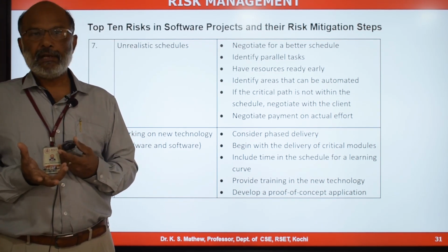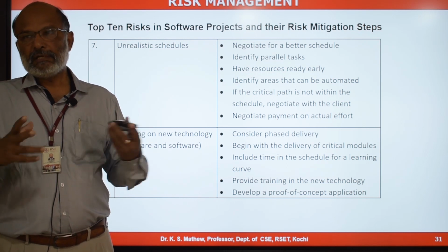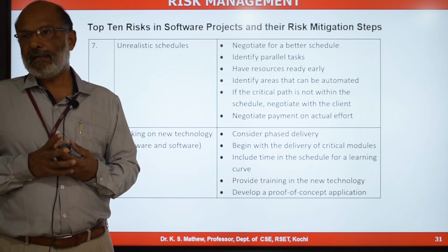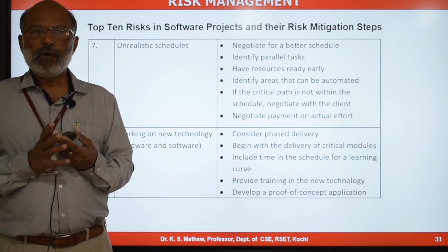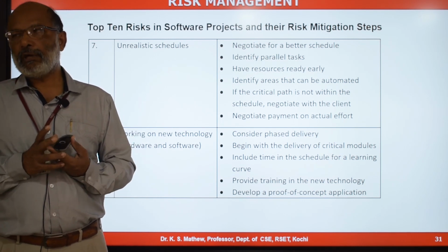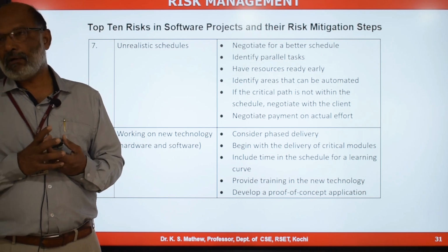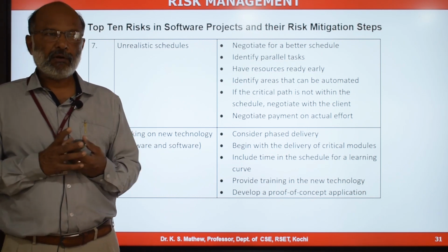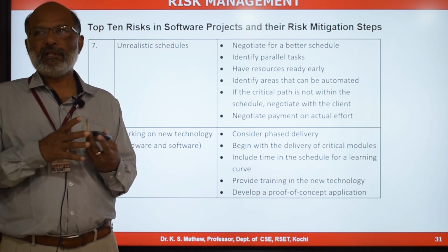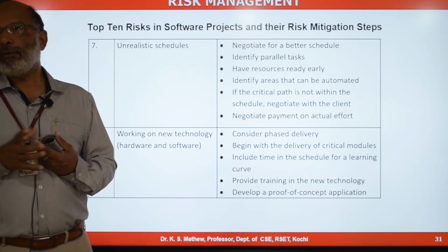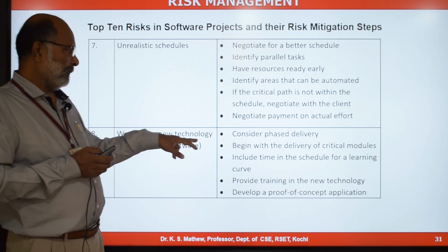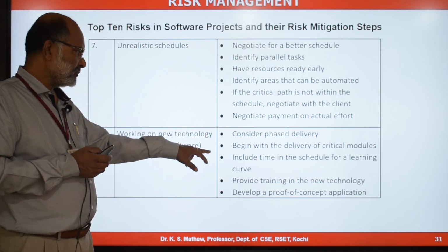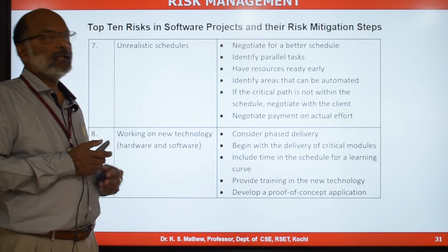So in the first iteration, you will consider developing the most critical components, and during that first iteration, you will resolve all the issues related to the new technology or unfamiliar technology or immature technology, unstable technology. All the problems can be resolved in the first iteration. Then you can take up other iterations and complete the project without much problem. Begin with the delivery of critical modules. Include time in the schedule for a learning curve.